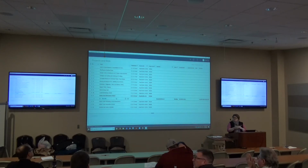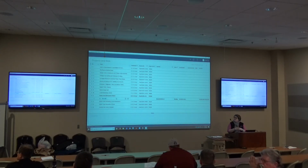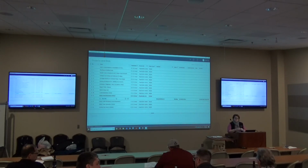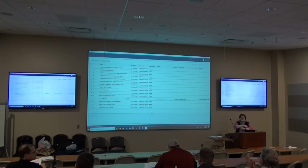Why would that be important? Why would I not want to just change that base bid to whatever it was? Because a lot of people want to know what the delta is. Sometimes I have owners that I give options to as I go through changing the bids, and then they say, let's go back to option 2. And if I've destroyed my list, I have to go back and recreate option 2. Exactly. So you always, in Excel, save as a new name, revision 1, revision 2. You never destroy an old estimate, period. So is that how you do alternates as well?